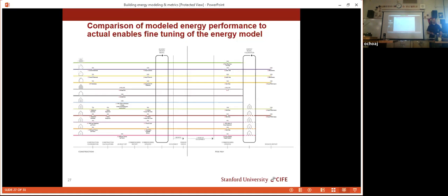Okay, perfect. There it is. Calibrate the drone before you take off. You sit there, you hit the button, you flip the control, and then you can take off. If you try to take off before that, it'll do all kinds of things. So the building's the same. When you first turn on the building, it isn't going to work. It takes time to calibrate the building. Then you have a calibrated model. You have a building with the set points, so you rerun the energy model to look at the building with the actual set points.